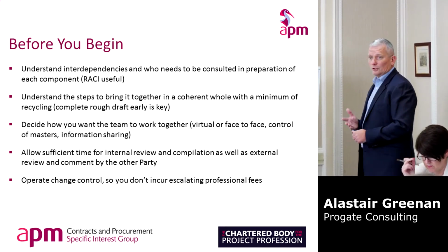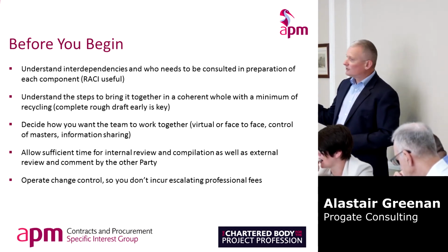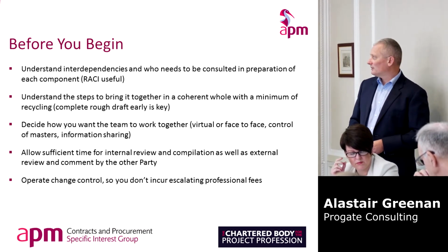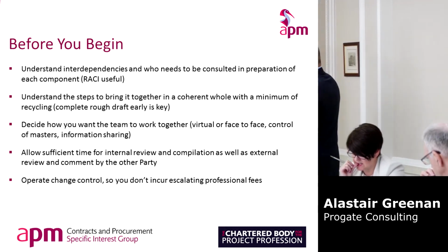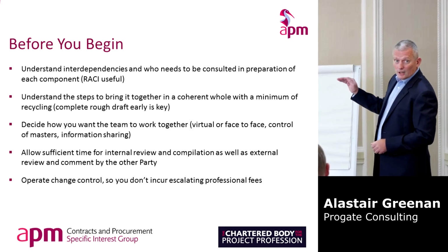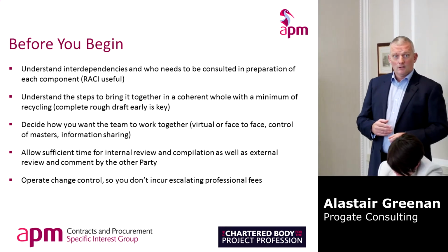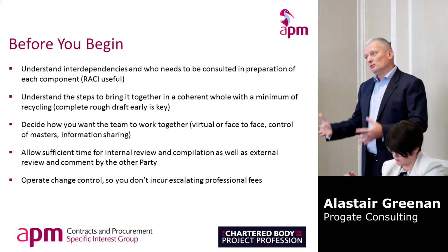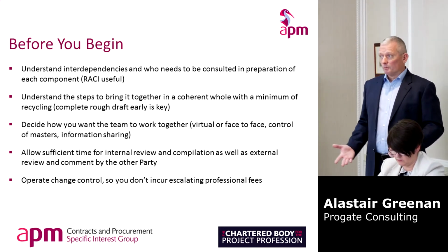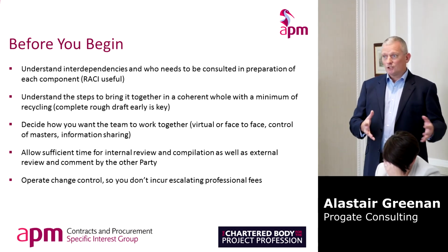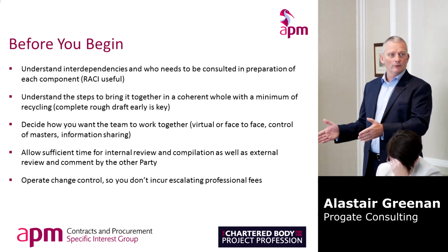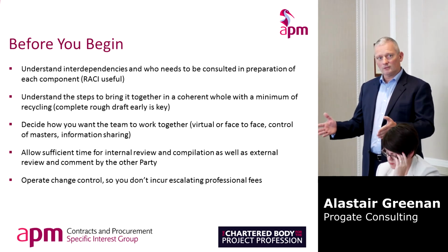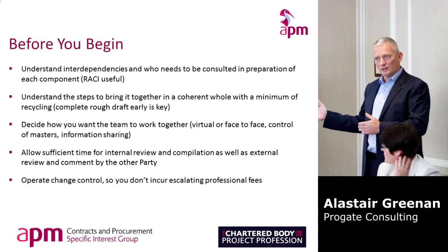Allow time for internal review and compilation, because at least somebody is going to write the wrong thing down or do it completely in isolation despite your best efforts at briefing. And then the other thing as well, just like in a contract, you operate change control on the preparation of the contract. So, you know, you basically want to be clear on what you're working towards, agree it as you go, stop people going backwards or coming up with brighter ideas. You need to go from management of change into a no-change mentality. Right, this is what we are now doing, and pick the point where that happens. Does that make sense? It's all pretty standard stuff as a project manager, isn't it? Even though you're actually doing a contract.